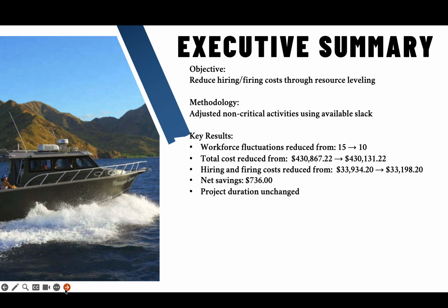Here are the key results from our analysis. Workforce fluctuations was reduced from a range of 15 workers to 10 workers. Total project cost was decreased from $430,867 to $430,131. Hiring and firing costs were reduced from $33,934 to $33,198. This resulted in a net cost saving of $736.